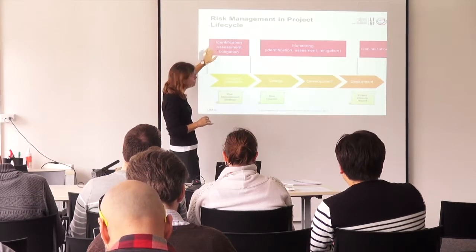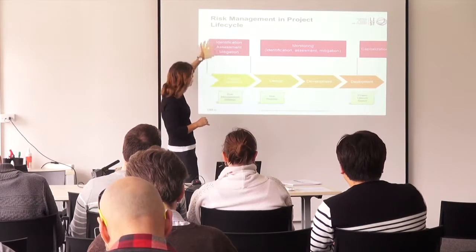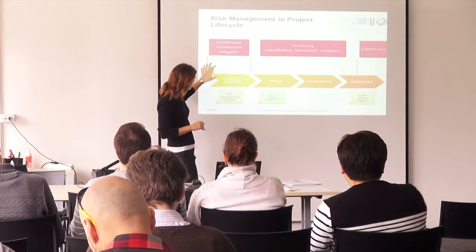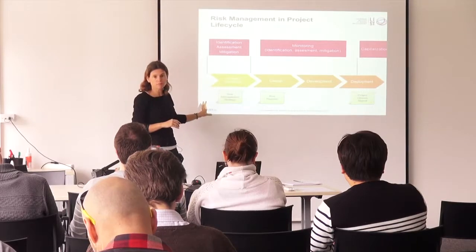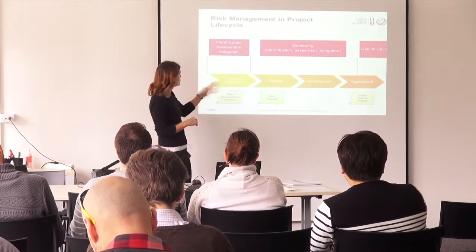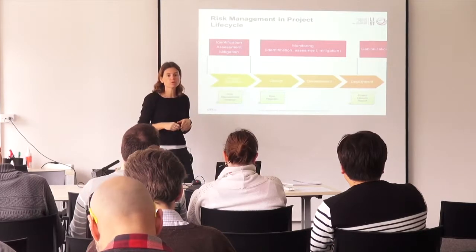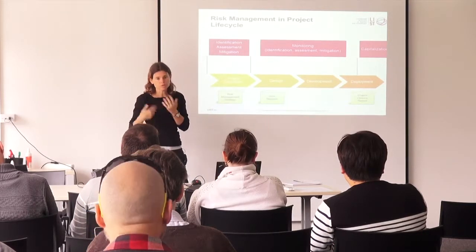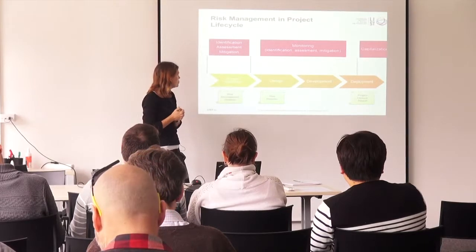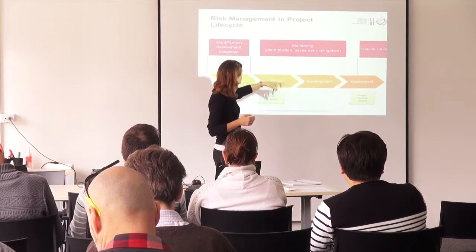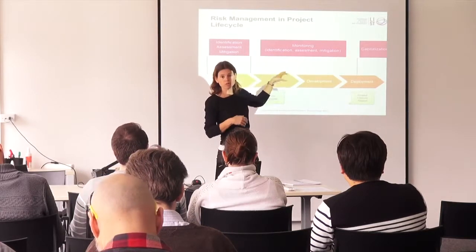Identification, assessment, and mitigation actions would happen a lot during the project definition phase. And then you might have at that step a document called the risk management strategy, or part of your project proposal, where you define how you intend to manage the risks. So that's one step.